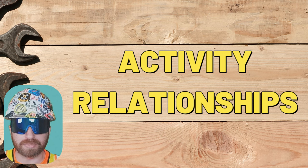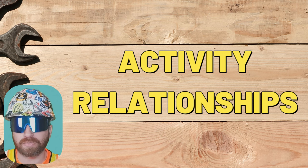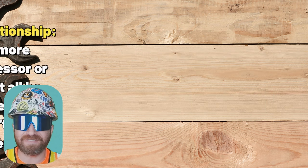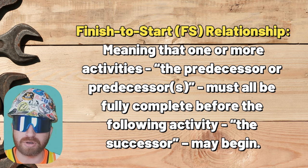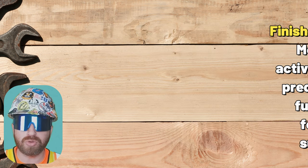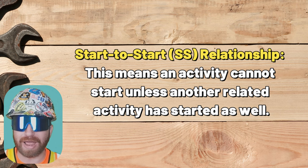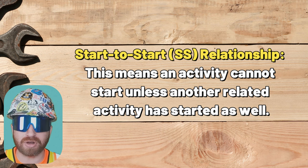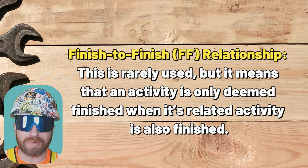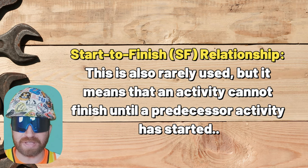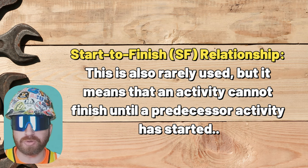There are four activity relationship types when it comes to scheduling. The first is a finish-to-start or FS relationship, meaning one or more predecessor activities must all be fully complete before the successor may begin — this is the most common type. Next is a start-to-start or SS relationship, meaning an activity cannot start unless another related activity has also started. Then there's a finish-to-finish or FF relationship, which is rarely used, meaning an activity is only deemed finished when its related activity is also finished. Finally, the fourth type is a start-to-finish or SF relationship, also rarely used, meaning an activity cannot finish until a predecessor activity has started.